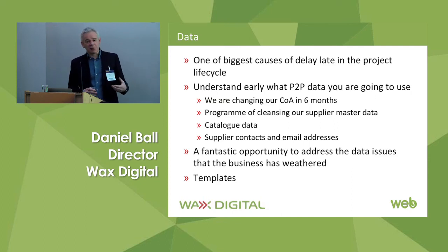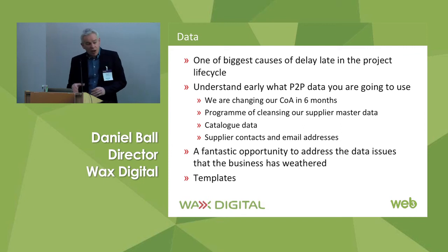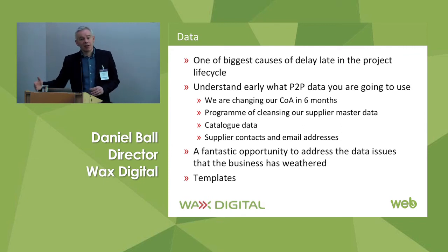quite a difficult cost to sell to the business if it's an isolated project that isn't part of a program like this. And of course, get your solution provider to help, with templates, with testing, with validating data quality and integrity through the program, rather than waiting till the end of the program to suddenly find out that you have a data problem.